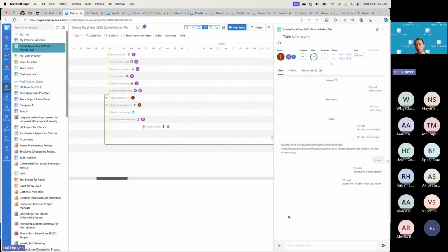One of the things you can do too is, down here at the very bottom, mention task. Or at the very top here, you can create linked task. This is a way for you, when you're on a particular task and need to create another task, and you want them to be synchronized together or at least linked together. That's what you do. You create these linked tasks, either by linking them for a standard dependency or to say that this task depends on that other task. Okay, so that's how a Gantt chart works within each particular project.